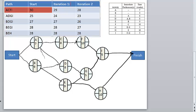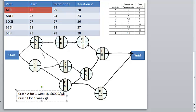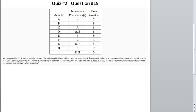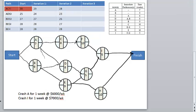So just to summarize: you're going to crash A for one week at $6,000 per week, and crash I for one week at $7,000 per week. You notice that you haven't exceeded your target of $10,000 per week — the narrative says a company could save $10,000 per week in revenue. After iteration two, you can see that BEH has now become critical.